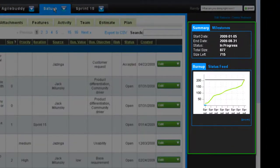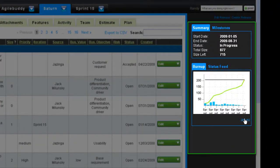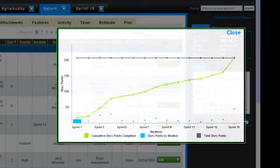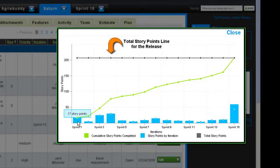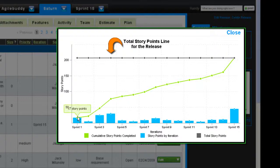On the release page, you have a burnup chart which tracks how much total work and story points you have for the release and how many of those story points you have completed so far.